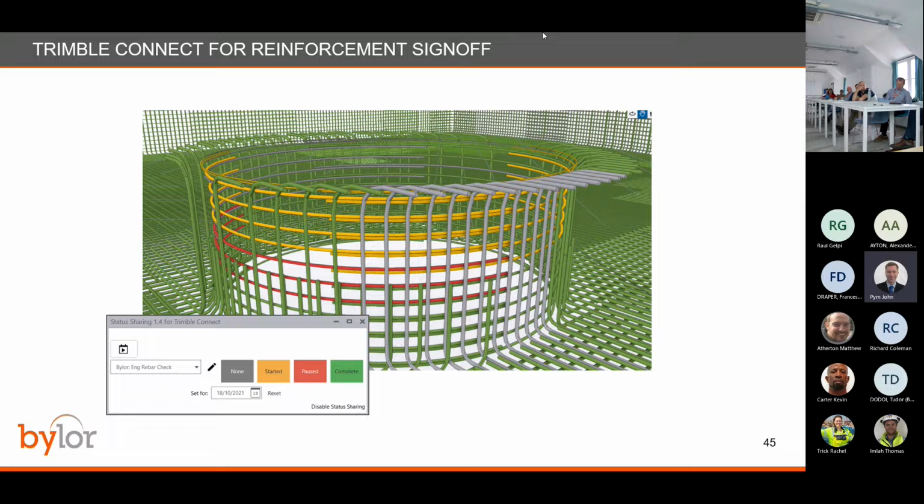We were actually able to download all of our tonnages from a data warehouse. It was pretty accurate. So we found that it was plus minus a ton, which sounds pretty bad, but then we had 1,000 tons of reinforcement in this pour. So what that actually means is 99.9% accurate. When I left this, there was some ongoing work to try and get that even more accurate. I would like to see where that goes.